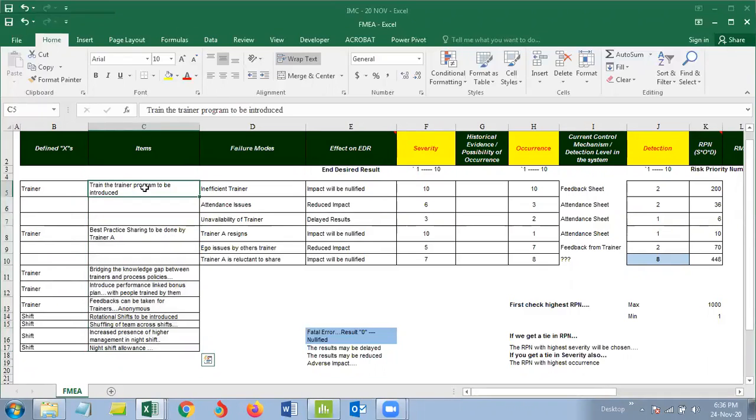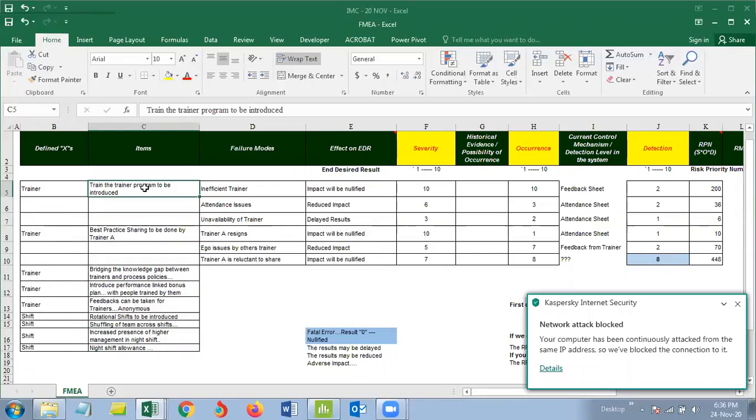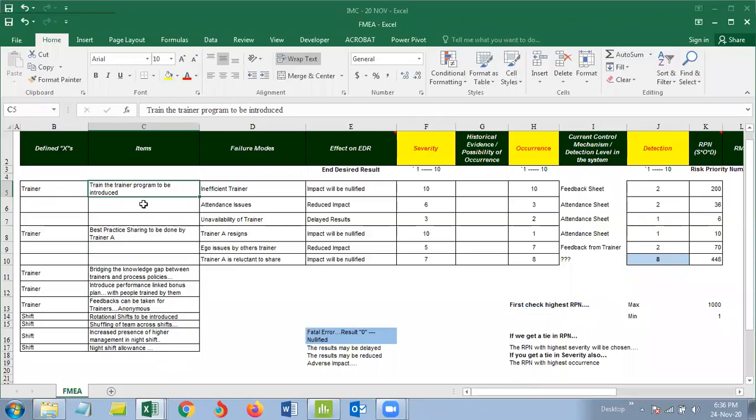Now these action plans that you've created, they must work. But in what conditions, in what situations can these action plans fail? There could be possible reasons. Now, we have not implemented these action plans, but we are speculating. We're trying to anticipate what can go wrong when we implement. And I don't want to be in a situation where something goes wrong and then I start looking for a solution. No, I want to be proactive. I want to know what are the possible ways it could fail. So we start with a team brainstorming session to understand what could be the possible failures. So failure modes, that's what we're trying to brainstorm for. We would like to have all the process experts, technical experts, and everyone who's relevant to the project sit together. We'll try to brainstorm for all possible failures.